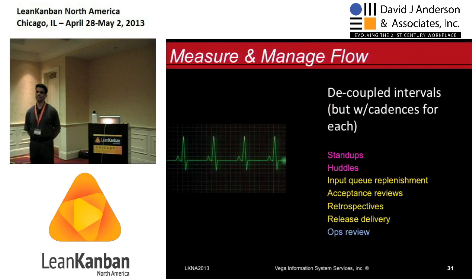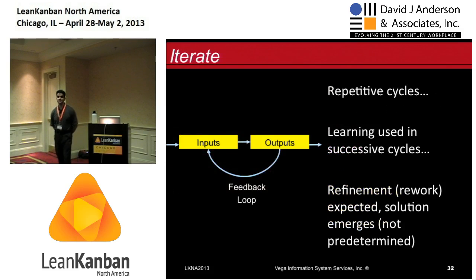Okay? That's the big key, because I hear people saying, we've used the Kanban method, Frank, but our team really liked doing planning, and since we don't do iterations, or since Kanban doesn't have iterations, we don't do planning. And I said, no. You still do planning, you just don't do 2-week fixed time box iterations. Okay? So they're using the word iteration and time box synonymously, which brings me to this slide.